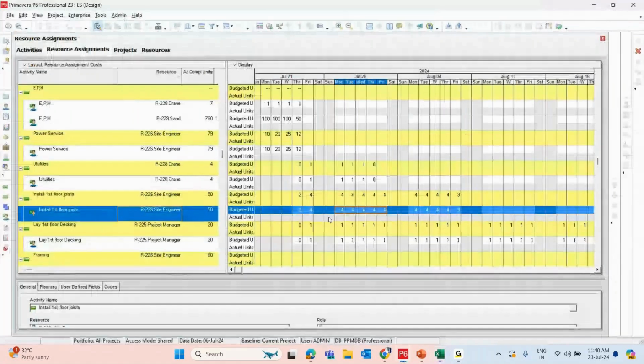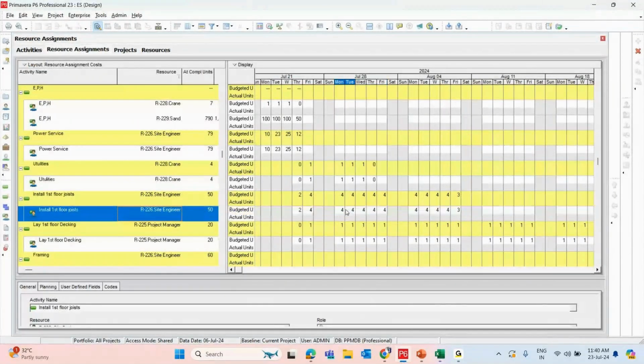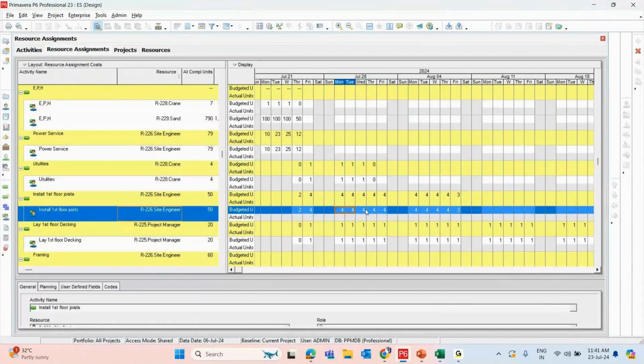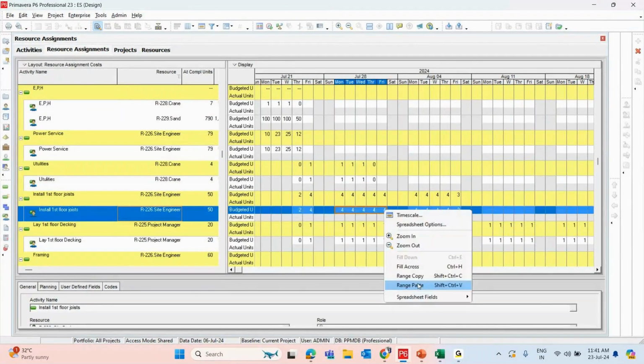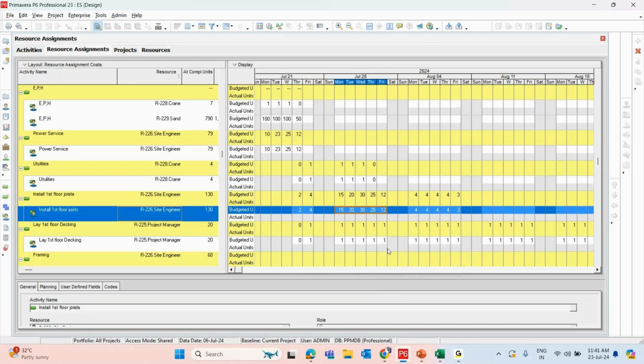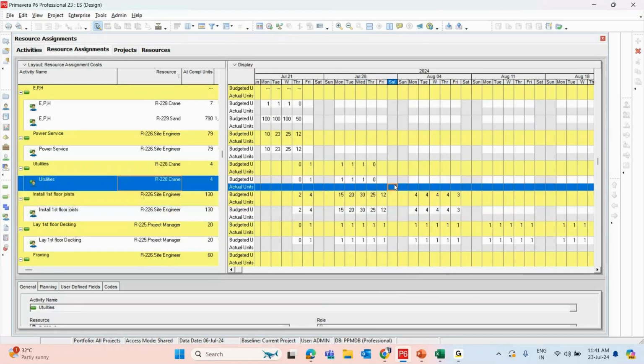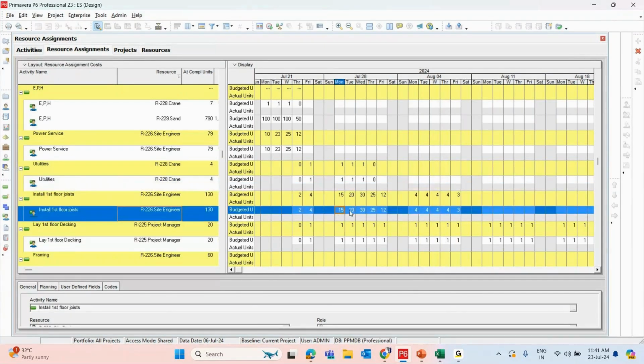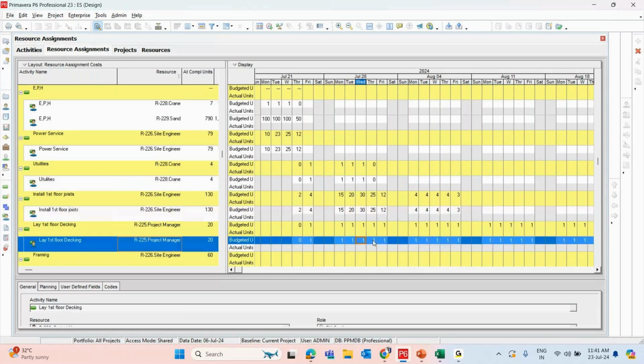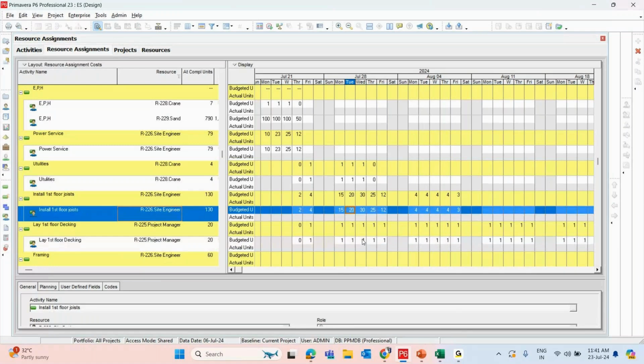Here we can select the same. These are all the areas we can copy. Apart from this, we cannot edit any other area. Why? Because in these areas and all holidays, we should not make changes, and we have to select only work days based on the calendar used for this project and resources. Based on that, it's showing only these areas where we can modify the data. We can copy and modify and then paste back the same for our requirement.